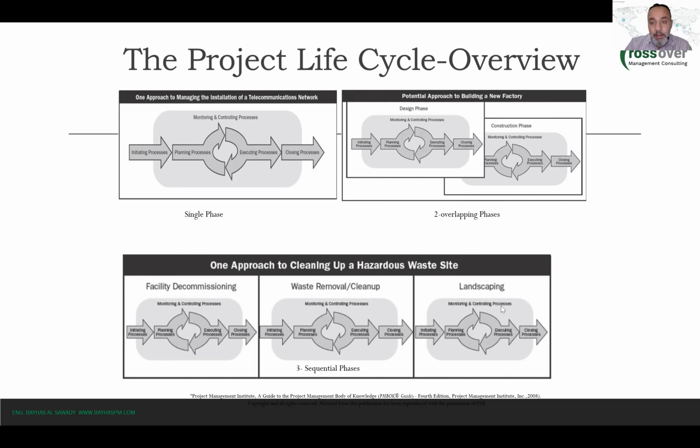Can we, for instance, start landscaping while there is some waste still on the site? We cannot, right? Yeah, so this is what we call sequential phases. So you cannot proceed to the next phase until you completely close out the previous phase. Okay, does that make sense?